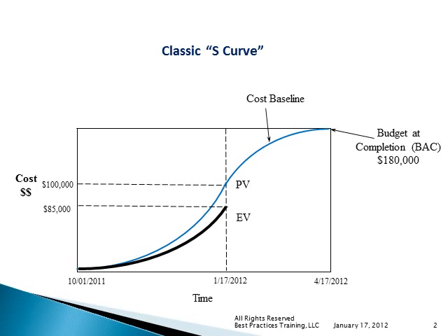And perhaps things cost you a little bit more than what you had budgeted originally. Maybe some of the tools and equipment, when you went to purchase them or lease them, prices had gone up and it cost you a little bit more money. Maybe some of the initial resources that you planned to bring in weren't available and you had to perhaps subcontract or swap in or bring in some more senior people, and labor rates were a little bit higher, and your spend rate, your costs were a little bit higher than what you had first estimated. So perhaps our actual costs are $110,000.